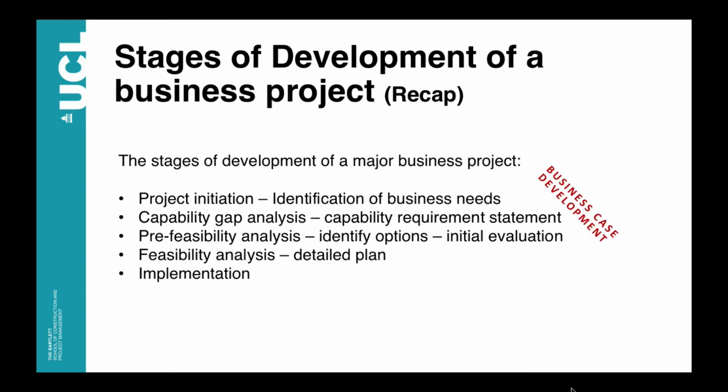Well, last week we were also explaining which are the main stages in the development of a major business project. We were considering the identification of business needs as a starting point in the project initiation. And later we were explaining that after the identification of the business need, we need to perform the capability gap analysis. From this analysis, we will be able to produce the capability requirement statement.